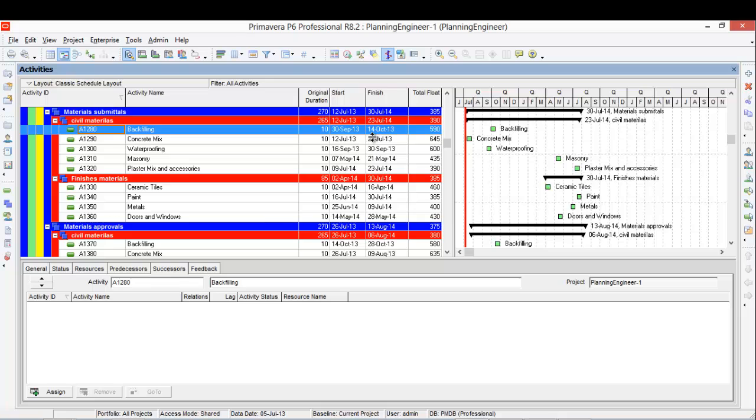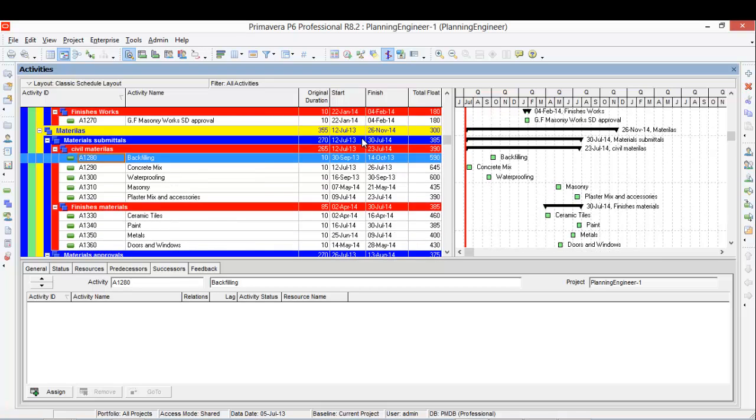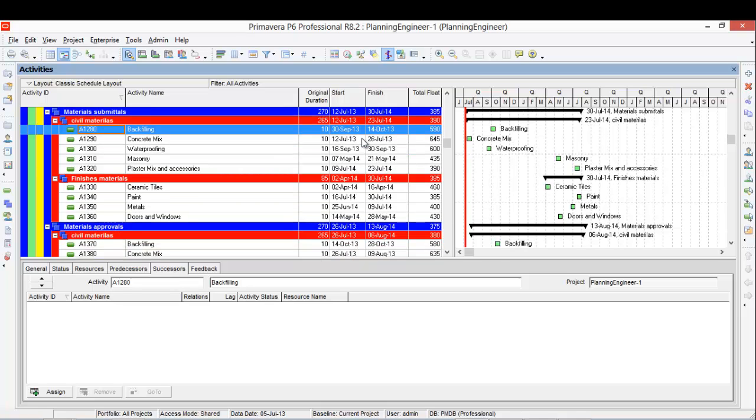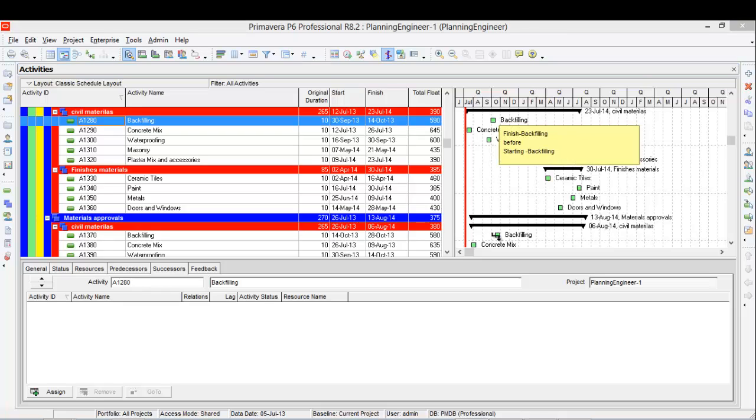After the backfilling, this is material. Material submittal. So I have to link it to the material approval here.